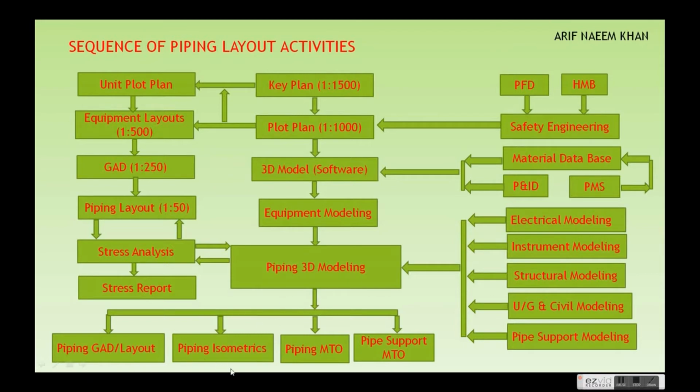With 3D model software, you can have very accurate quantities of piping MTO and pipe supports MTO. If you compare 2D and 3D, 3D software initially requires a lot of time to develop a setup or prepare a setup for 3D modeling, but in the end it will save a lot of money, effort and time to prepare the final product or final drawings.